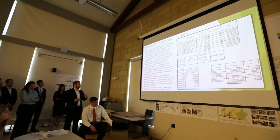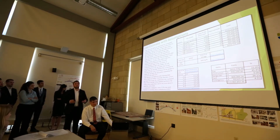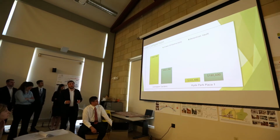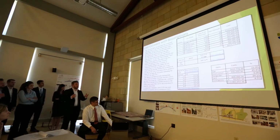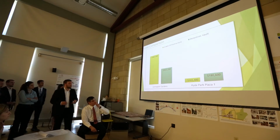And for the construction contingency, we went with 10% of the construction cost, because that is also the normal percentage that the Metropolitan Sewer District uses. So the estimate that we went with was about $2 million, and after that, we looked at implementing rain gardens, the price ranges.